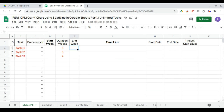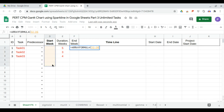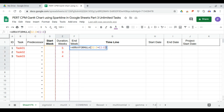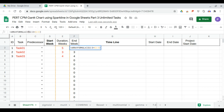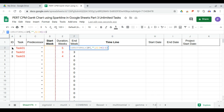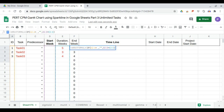Next, we continue with the end week column, which is equal to the start week column plus the duration column. We don't want to see empty results, so we correct the formula using an IF statement: if the A column is empty, then return empty; otherwise, calculate.